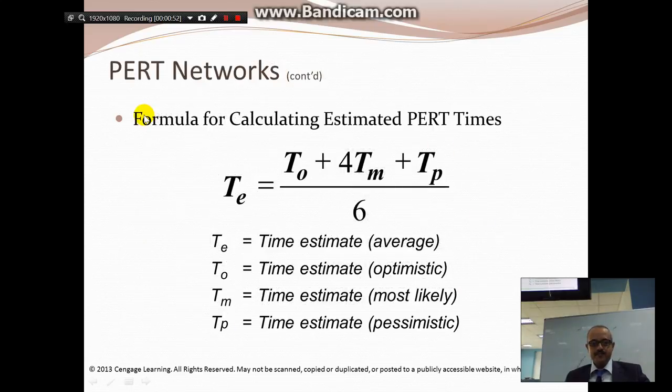Let's look at an example here. This is the equation for PERT times. These are terminologies to understand before you look at the example: Te, To, Tm, and Tp. Te is time estimate, To is optimistic, Tm is most likely, and Tp is pessimistic. The equation is that the time on average will be the optimistic plus four times your most likely plus the pessimistic, divided by six - your total estimated or average.